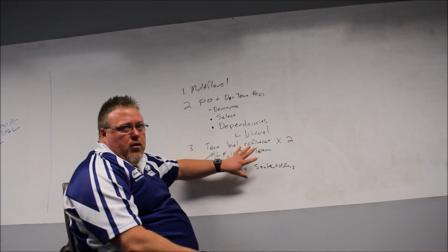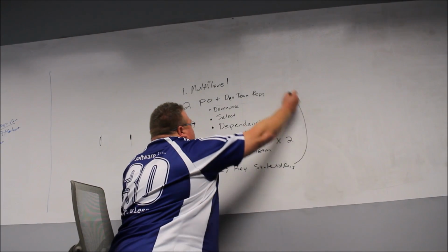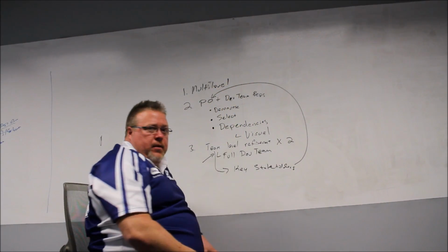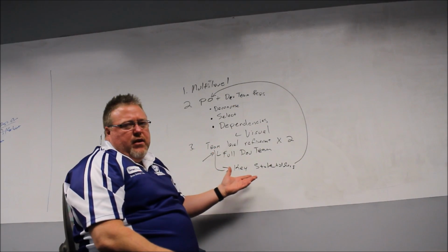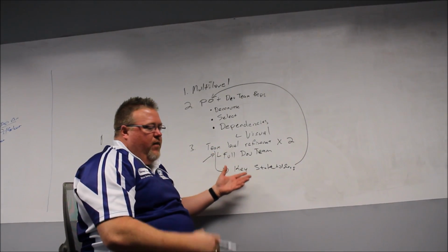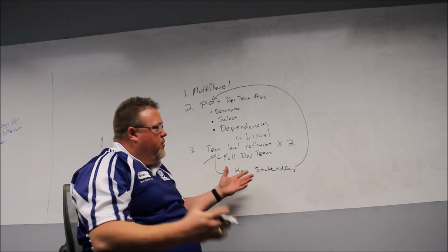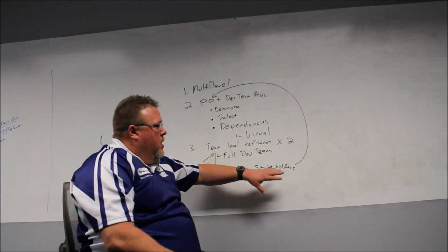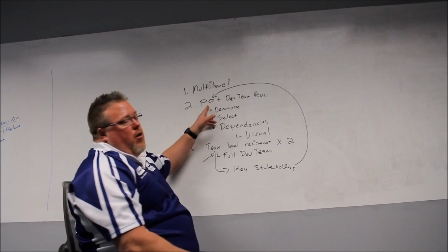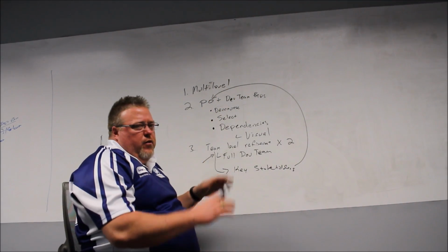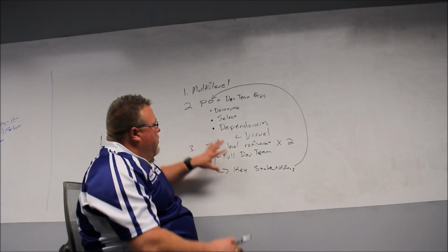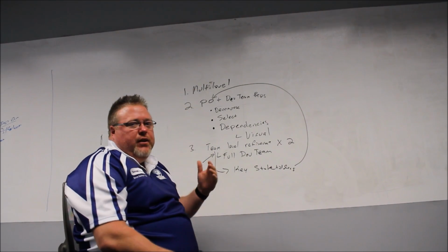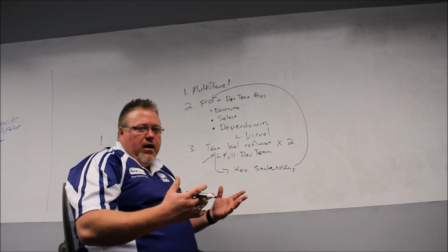Now, once this occurs, we need to have some way to provide visibility back to our product owner. So usually this doesn't occur in a meeting. It usually occurs via a document or a Scrum tool. And so the team says, okay, we fleshed out the details of these product backlog items. Now let's make sure our product owner is okay with them. And usually there's a few tweaks after that. But that's essentially how you deal with multi-level refinement in a scaled environment to do Scrum.